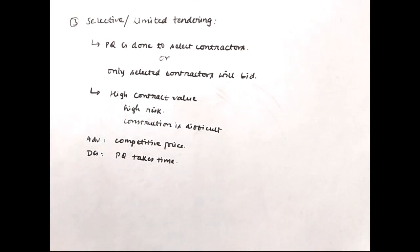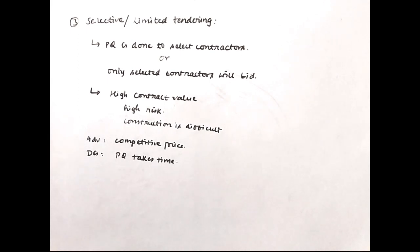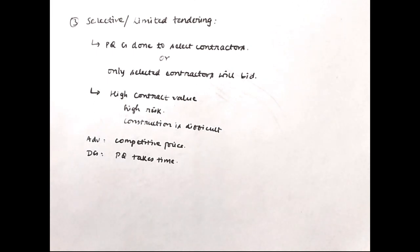The advantage of selective tendering is highly competitive prices, since the number of bidders is less than open tendering but more than negotiated tendering. A small disadvantage is that the pre-qualification process can take some time. So to summarize: we covered what is a tender, how it differs from a contract, and the three types of tendering — negotiated, open, and selective or limited. Please like the video, subscribe to the channel, and check out other videos on tender, contracts, and billing.